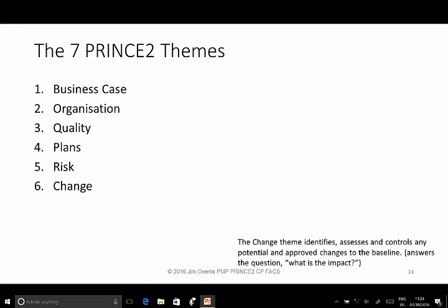The aim of good issue and change management is not to prevent changes from occurring, but rather to ensure that changes are fully investigated and only essential changes are considered and are subsequently authorised by the appropriate people. All approved changes must be reflected in the project's documentation and baselines.